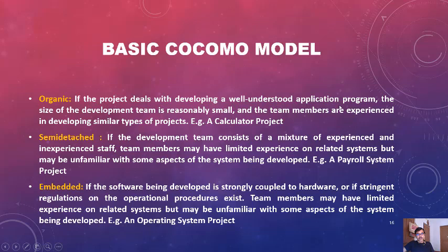That means the employees working on that project are few, and the team members are experienced in developing similar types of projects, or maybe a little less experienced. In that case, we can use the organic type. For example, a calculator project.